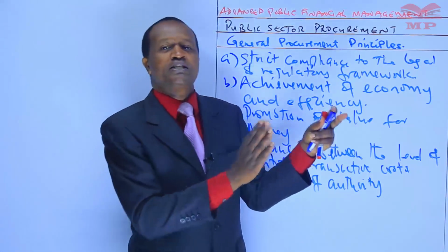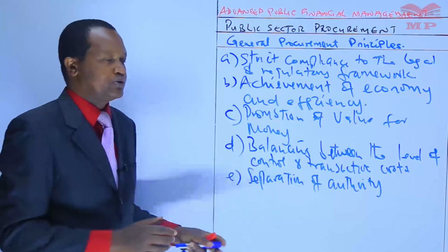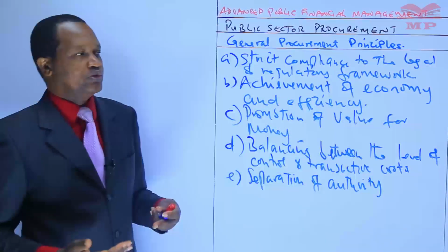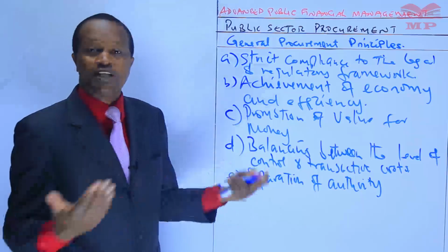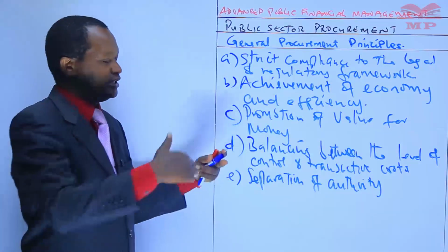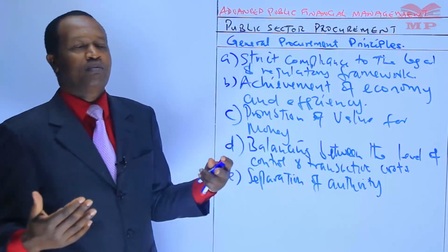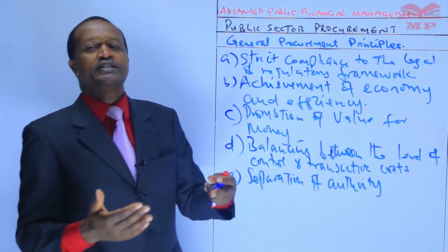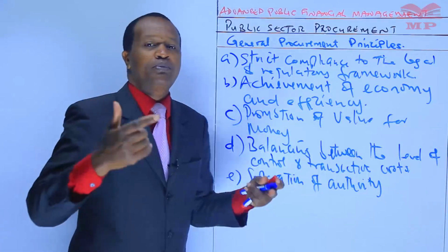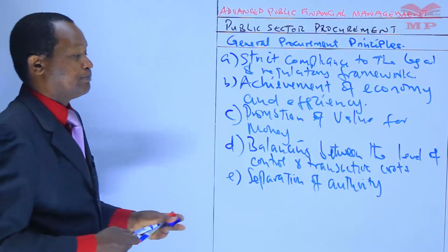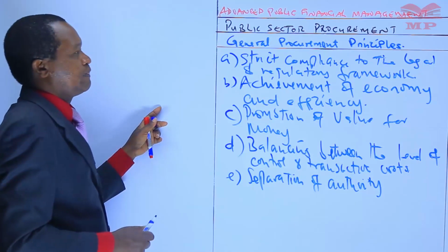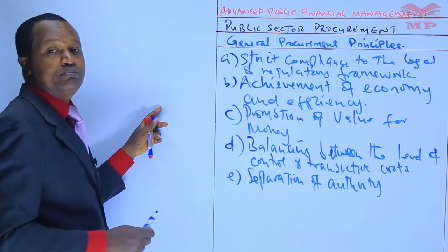At procurement initiation, there ought to be separate authority. At vendor or supplier selection, we ought to have a different authority or person. At the commitment level, different or separate individuals carry out the receipt inspection and acceptance of procurement objects and so on. Separation of authority is a very critical procurement principle.